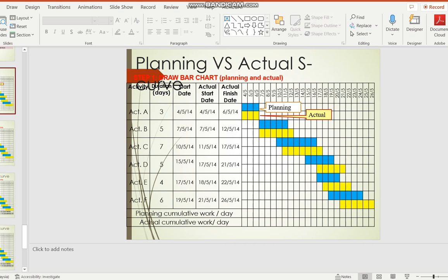Even though it's been planned at 5%, what does the 5 mean? You cannot say that, okay, just because the month is up, you put a 5. You have to look at the physical work. If 5 means that the ground floor slab is all done, then at this point in time, if the floor slab is done, you can put 5 here.